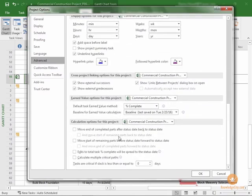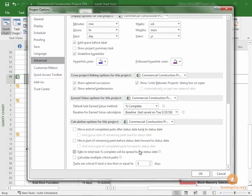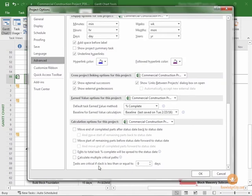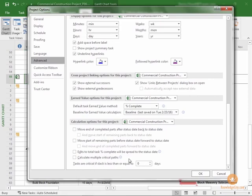Here, there's an option for Tasks are critical if slack is less than or equal to, in this case, it's zero days. So if we affect this number, then as slack becomes close to zero days, well, currently, as it's set now, when slack is equal to or less than zero, of course, it can't be less than zero.